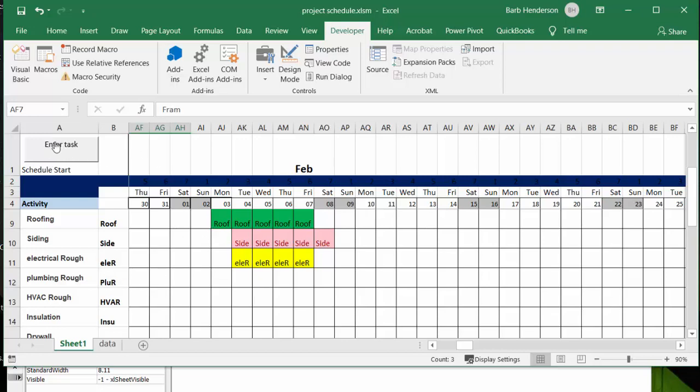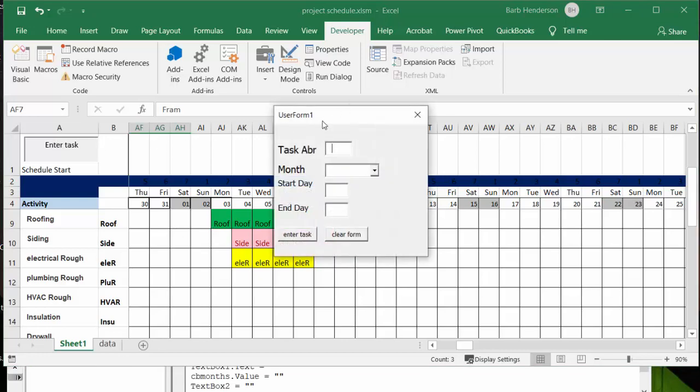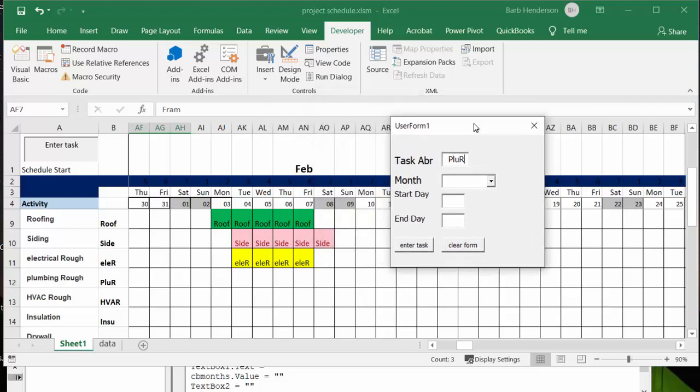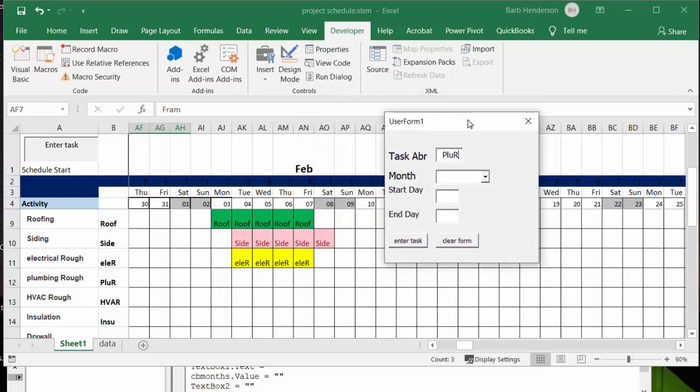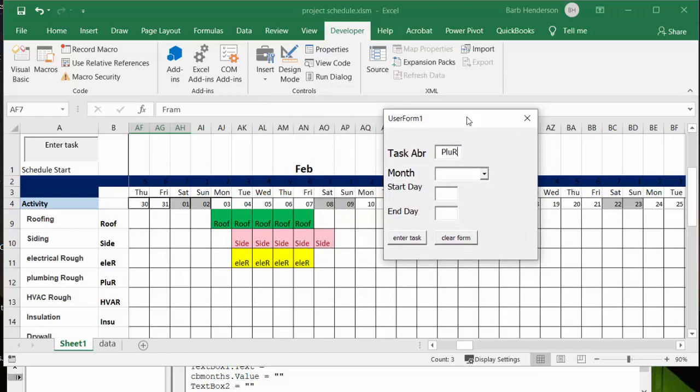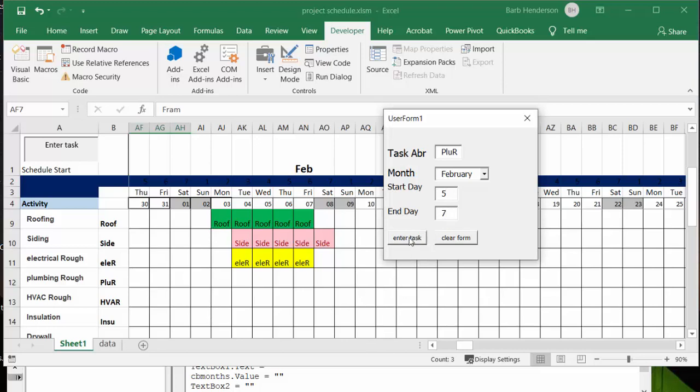So what we're going to do is I'm going to hit my button and it'll bring up a user form. So I'm going to say task abbreviation is plumbing roughed in, so it's P-L-U-R, so I'm going to enter that. Okay, and I'm going to start that, let me look at this. So I would say that probably I could start that on Wednesday the 5th here, so it's going to be February. I'm going to select and I'm going to do the start day of the 5th and I don't know how long that takes, let's give them Friday.